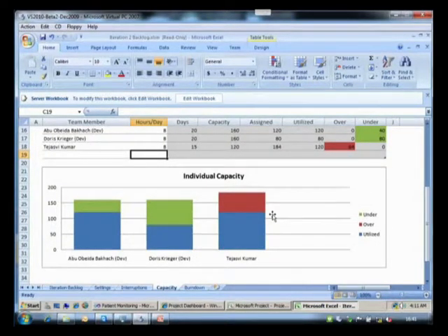So you have one guy who is totally overloaded. That's 64 hours overutilized. And then we have 2 of my colleagues who are fairly happy in life, chilling out in life. Look at the green section there at the top. So they're underutilized.